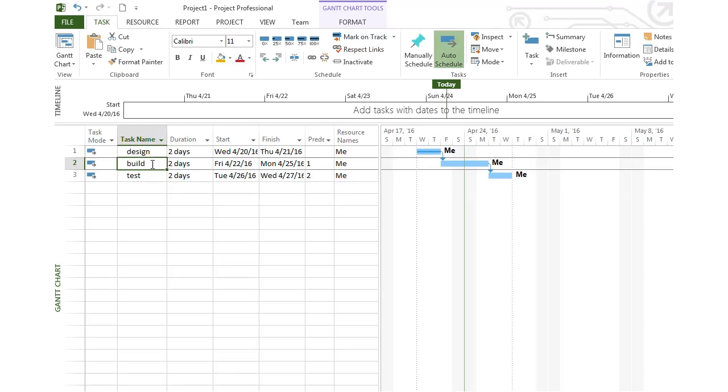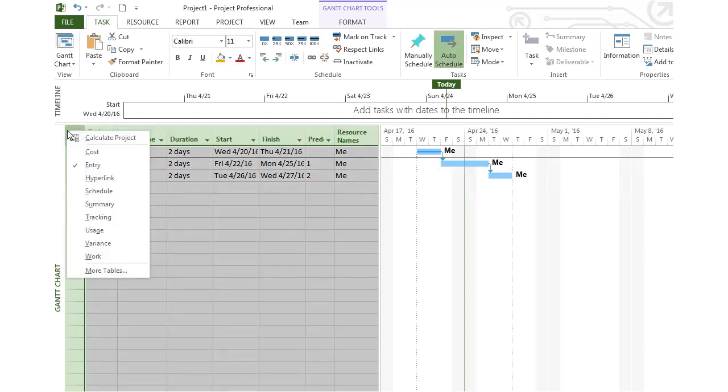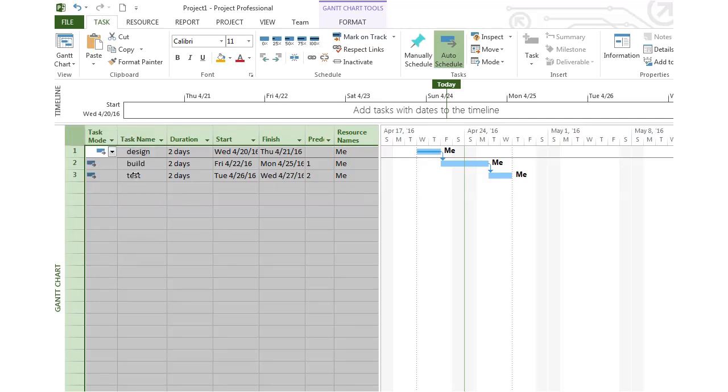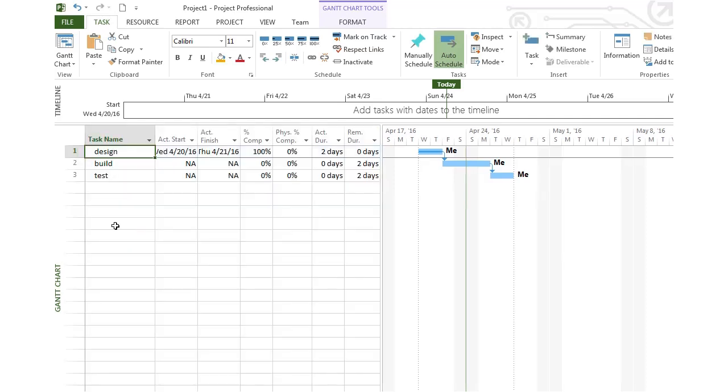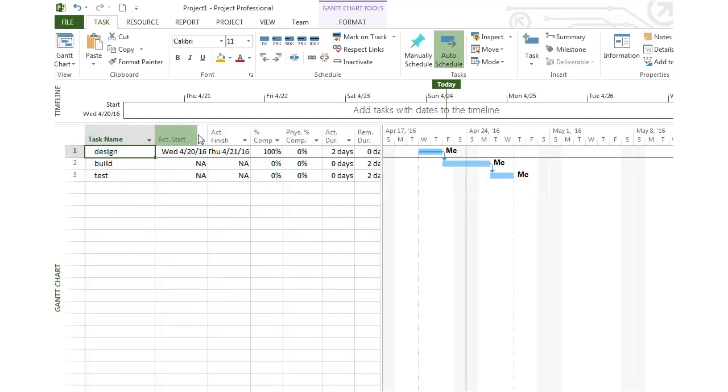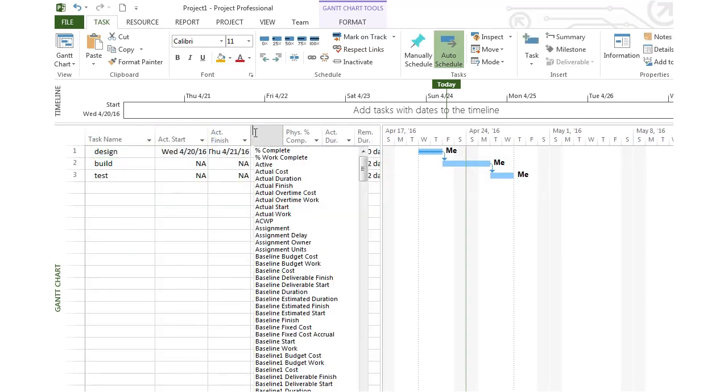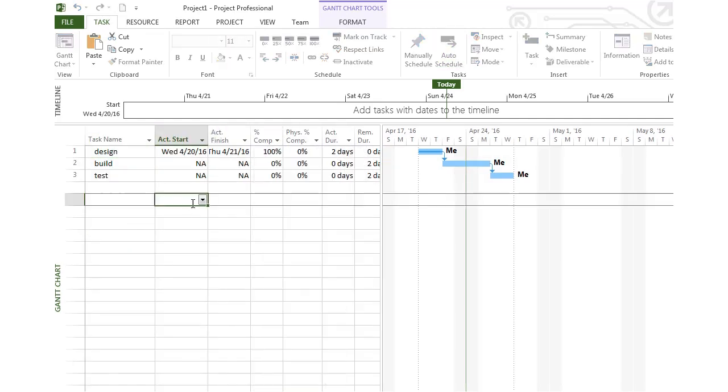We go down to the build phase, and that may or may not be on track. We can look at things in a different view called the tracking Gantt chart. If you click on the corner of your Gantt chart, or the entry table part, and choose tracking, I can see my actual start date, my actual finish date, and the percentage complete. Your actual duration sometimes is not the same as your estimate.